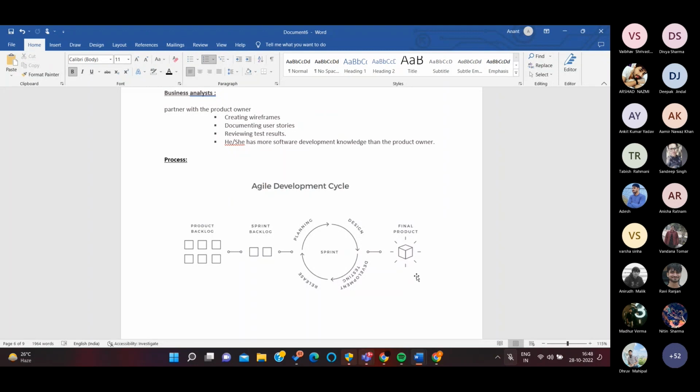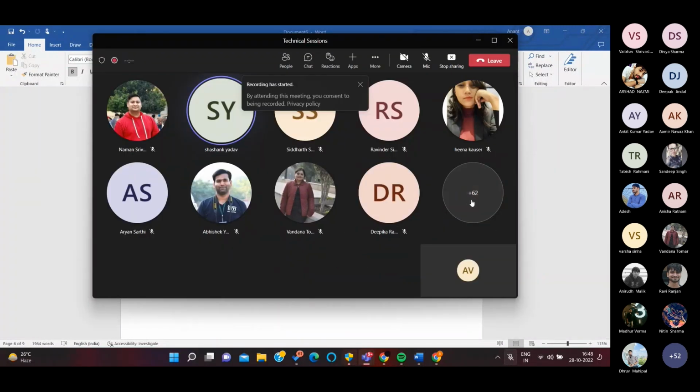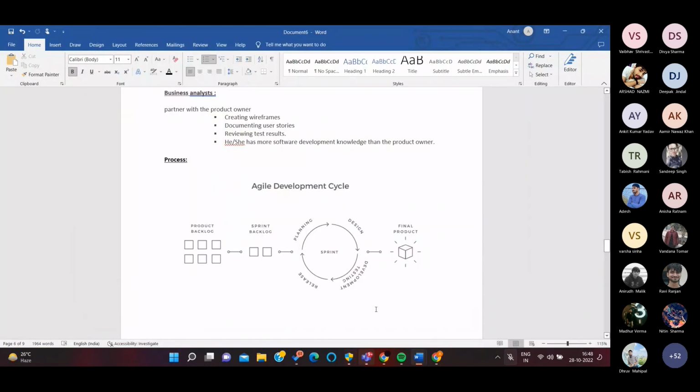If the team is closing their tasks within the sprint time, the chart goes down, telling us the sprint is going well as the number of tasks is reduced. But in Kanban mode we don't have metrics which tell the performance. It is just to accommodate new frequent requirements so that we can start the work. I hope you got the point.